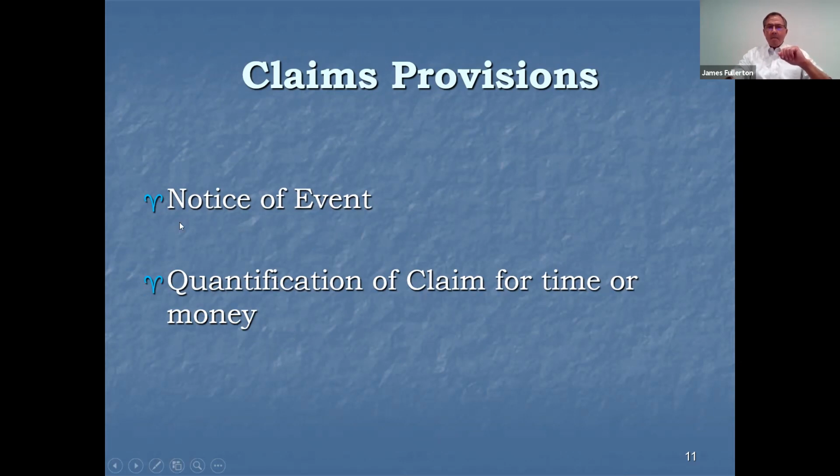I bring this up for a couple of reasons. One, my main mantra, what I keep saying over and over again, this notice of the event is the most important. That's what you cannot miss. If you miss that, you're losing your rights. We're happy to do what you told us today to do. We're happy to comply with that. We just want to make it clear that that is going to cost extra money and it is going to impact the schedule.